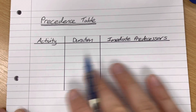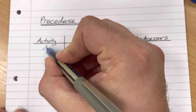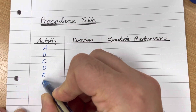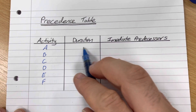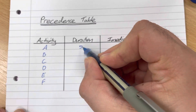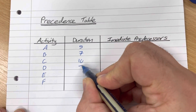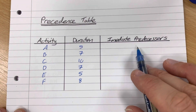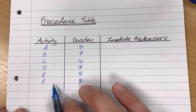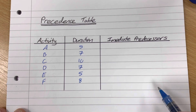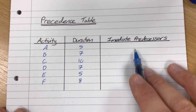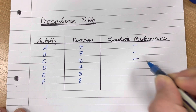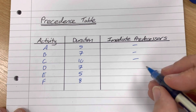So, for example, we've got this table here. We'll have activities labelled over here, which are typically written as capital letters. We then have the duration of said activity. And then the immediate predecessors will tell you which activities rely on which other activities to have been completed. You have to have at least one activity which is blank, otherwise you can't start the project.